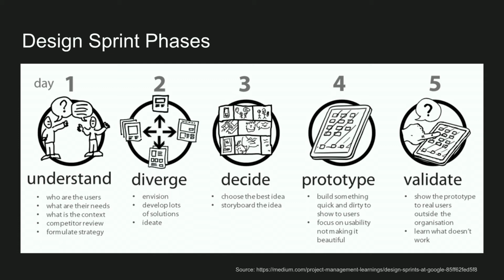Depending on the different roles in your company, you may invite a couple of engineers, or the product manager who's not very technical and the CEO from the business side. You can make that judgment call as you're going in. Definitely you shouldn't have more than 8 or 10 people in the room. More than that, it becomes very difficult to manage. When you throw in all these different types of people, many of whom probably haven't read much of Robert's team building philosophy, you could spend a whole 3 days just understanding how to communicate with each other, let alone get through the work.